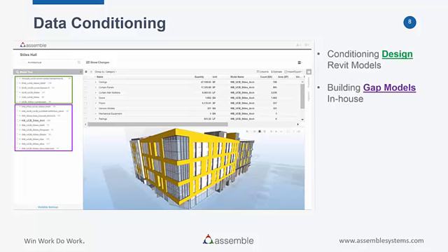Absolutely. So, in this instance, we were in pre-construction for, call it 12 months. We saw 3 to 4 major milestone deliverables between conceptual design, schematic design, design development, and CDs. Ultimately, design is never fixed, never rigid. The design team and owner make design decisions. We have to interpret those design decisions and put a number to it. And oftentimes, our numbers can influence the design development.